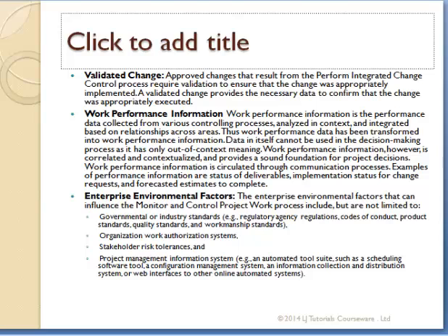Also, I will be able to validate change. Whenever a change request is raised, it should be validated. Is that change necessary? You should raise a change control board, what we call a CCB. They look at you making a change. You want to shift the project end date by 2 weeks. They look at it. Is it worth it? Must you do that? They can reject it or they can approve it.